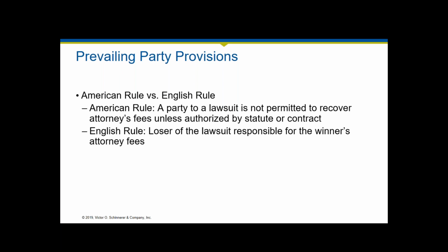Contrasting that with the English rule, if you lose a lawsuit, then the loser of the lawsuit is responsible for the winner's attorney fees. Now, we're not going to resolve this issue of what the litigious environment of the United States is, but certainly for folks who are involved with negotiating contracts, we often see prevailing party provisions included in the contract. This could be something that the owner wants, or the design firm may well want to insert.